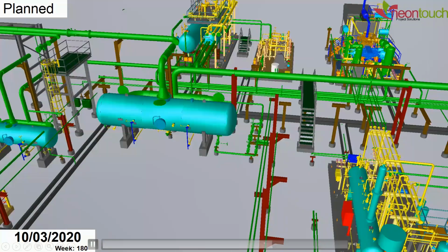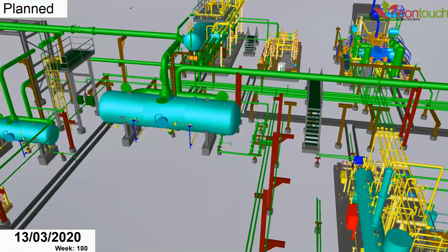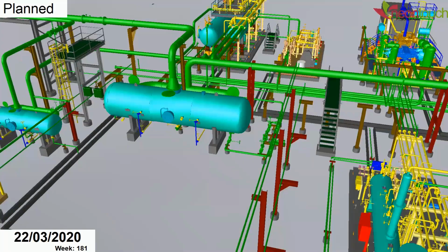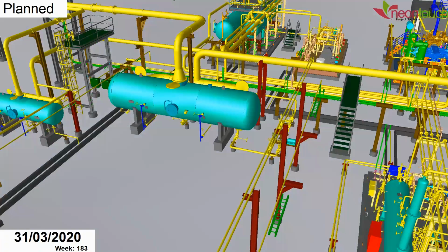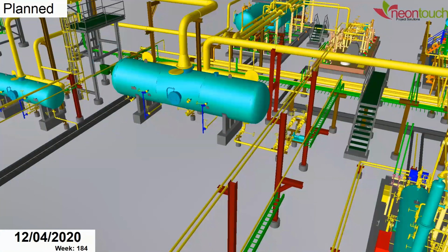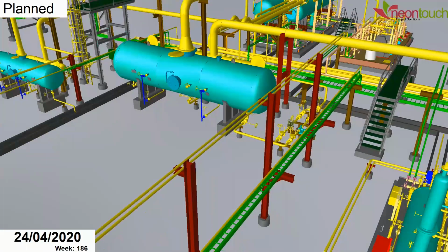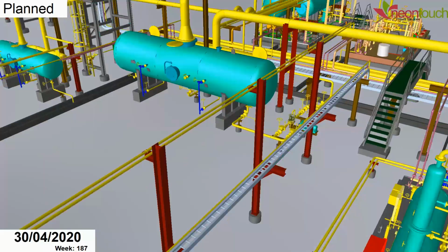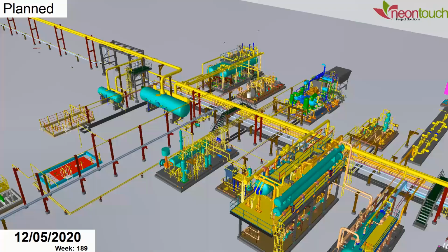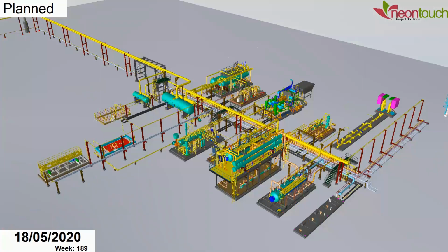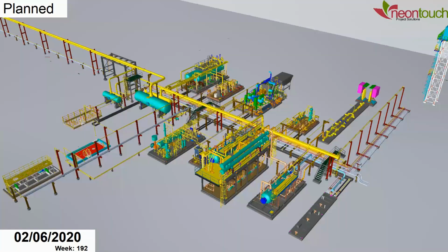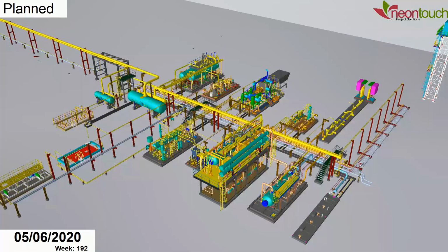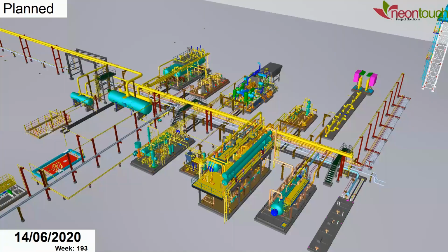You can actually narrow in on particular equipment or particular systems to check on their level of completeness. I'm going to show you another slide where you can actually narrow down on different systems and use that to begin to do some of your turnover planning work. Because with this, you can begin some of that work as early as possible. You can even do some of that before construction is done, just to give you a little more time at the turnover stage.